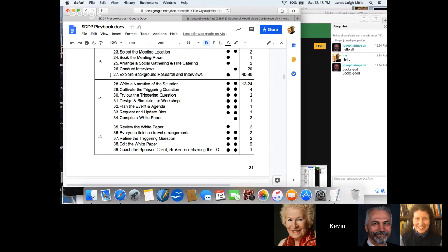by people. For example, you have an introduction. You got 36 people around the table, and the typical thing, everyone wants to be introduced because many of them have never met each other. We're representing very broad perspectives, so they're not from the same domains of expertise as each other are, and they don't know each other. They feel uncomfortable. Who's who here, and what am I going to be fearful of saying or not? And I've been in sessions like that. If you have 36 people speaking for 2 minutes, that's over an hour of introductions.